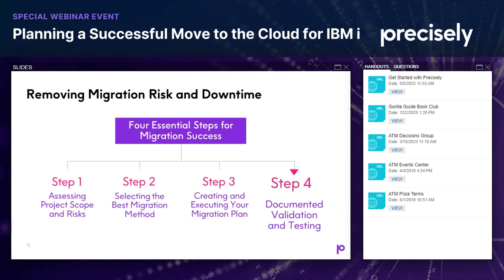So moving on to step 4 then, bottom line is you want to document appropriately, right? And then you want to test. Documentation and planning, number 1, testing, number 2, or 1A, or basically 1 and 1 asterisk. They're the most important parts to any migration, the upfront planning and validating. You want to do rigorous testing of the environment. It's critical, and you want to build that into your time window. If you're doing a tape save and restore, for example, you want to be able to build that in. With replication, you can do that as part of the process.